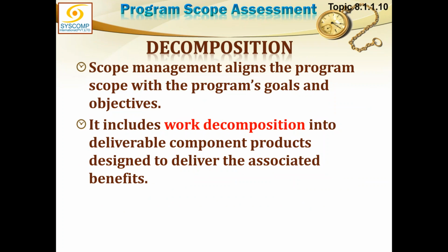Like we created a work breakdown structure in project management, we have the same kind of thing here. It includes work decomposition into deliverable component products designed to deliver the associated benefits. It is not the in-depth WBS, but a WBS showing the work decomposition down to the level where the specific deliverables necessary for benefit delivery are designed, not any further.